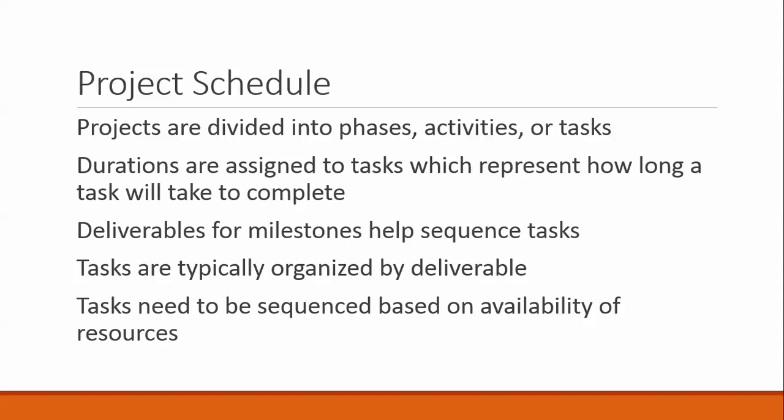deliverables along the way. So typically we sequence our tasks into deliverables, and these deliverables often become milestones. Tasks are typically organized by deliverable. Tasks need to be sequenced on a variety of different things, but especially sequenced around resources. Resource availability as well. So if you think in terms of a website that needs to be built, we have a variety of different tasks